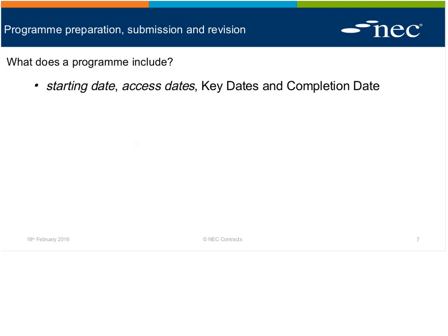So firstly, what does it look like? What does it include? So we know it's a holder of very important dates. Very often the reason they're italicized there is they're transposed directly from contract data. And if the first bullet point here is the contractual deadlines, then they're always paired with the reality of progress. So we have the contractual deadline of completion date paired with when we're planning to complete.